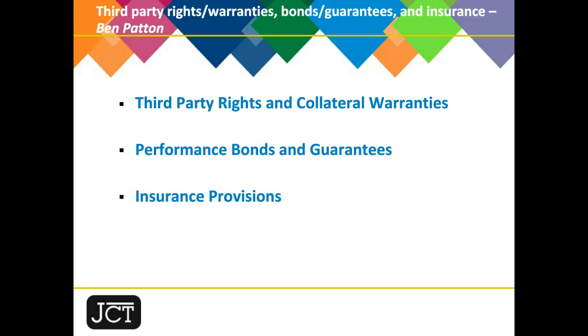In the minor works forms, clause 5.4c now permits insurance of the works and existing structures by what's termed other means. So if different insurance arrangements are stated in the contract particulars, that is then what applies. So the flexibility to reflect market practice and the challenges that have occurred in relation to how insurance responds and what insurance is in place has been reflected through the documentation in 2016.